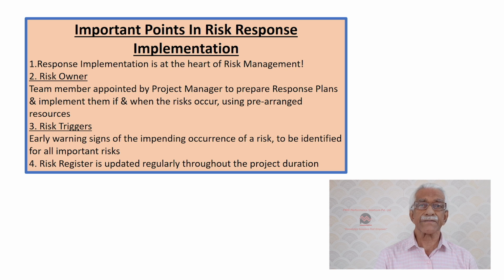The other concept is about risk owners. The project manager appoints certain people as risk owners, and these are the people who prepare the risk response plans and implement them if and when they occur. These are two important concepts. If the previous process of risk response planning has been gone through properly, then this is a smooth affair, and risk response implementation is at the heart of the risk management effort.